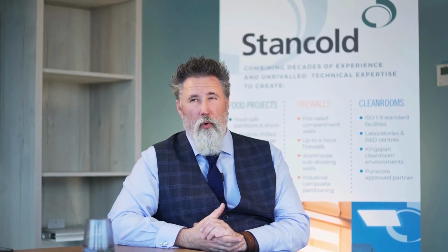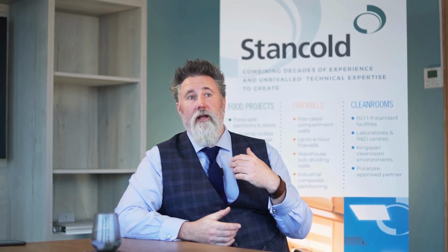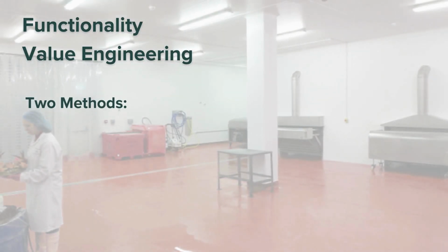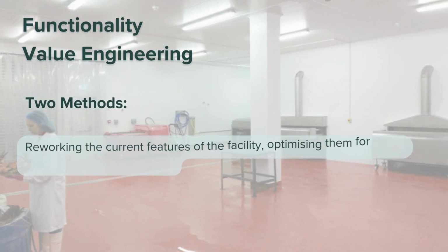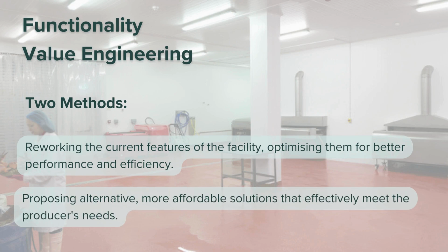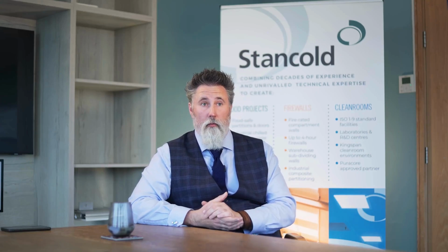We like to do client visits wherever possible and see the client sites before we price for a project, and it's really important for us in terms of understanding the functionality of the space, understanding how the client's going to interact in that environment, how they're going to store their goods, how they're going to move around that space. And it's often a good opportunity for us to present alternative ideas, changes to the layout, which we feel would be, in some cases, a lot more cost efficient and eliminate dead space or wastage.